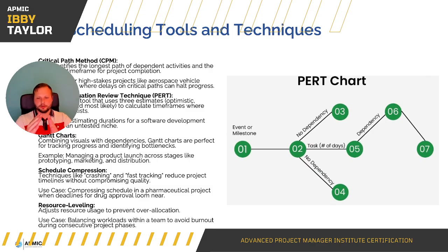But there are going to be things that come off that branch, that come off the critical path. Once the plastering is done, you can then get the internal fitters in. You can also get the electricians in. You can also get the decorators in. You can get the flooring people in. But they aren't on the critical path. The critical path is determined by the things that are dependent on one another. So the foundations, the walls, the roof. It's those critical things that exist in a path connected to each other by dependencies.